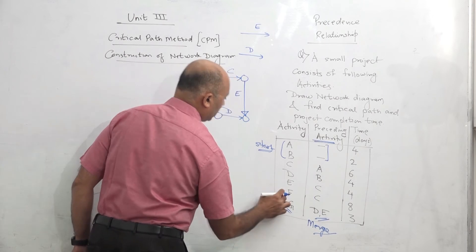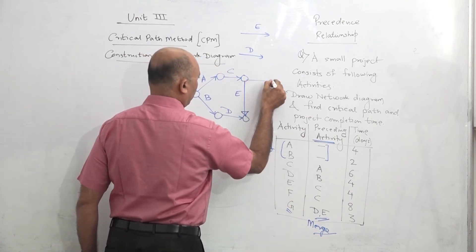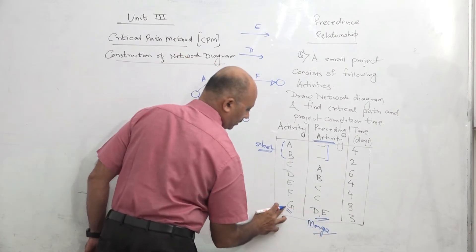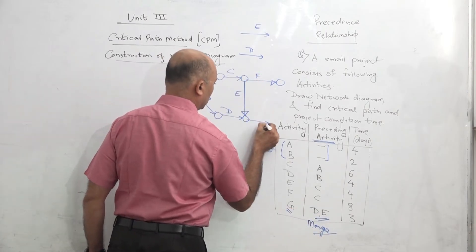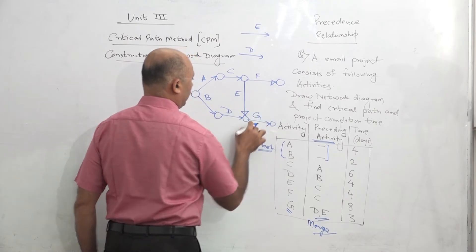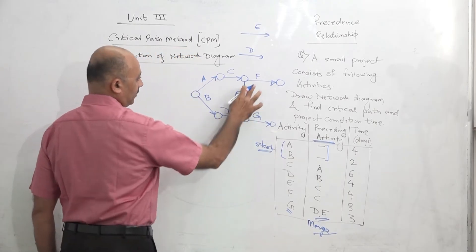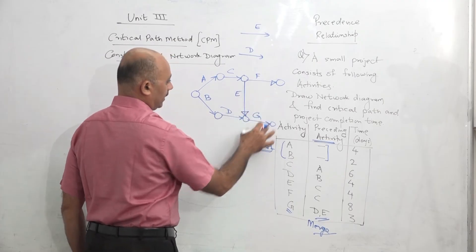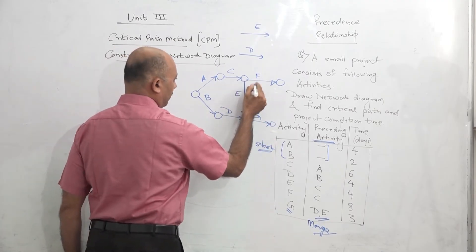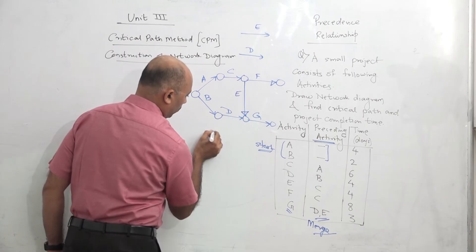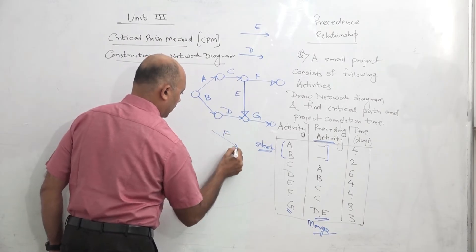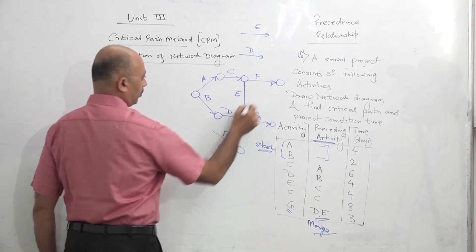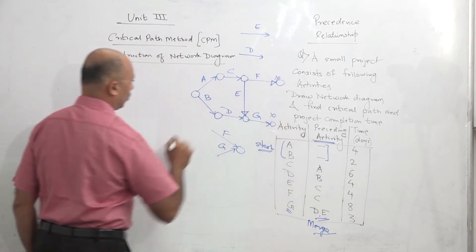After C, there is another activity F. After D and E merge, there is the last activity G. After F and G, there is no other activity — meaning F and G are the last activities. So they cannot remain hanging; F and G should merge together in a common point. The project should have only one starting point and only one ending point.